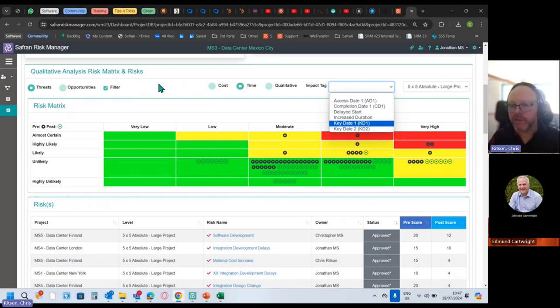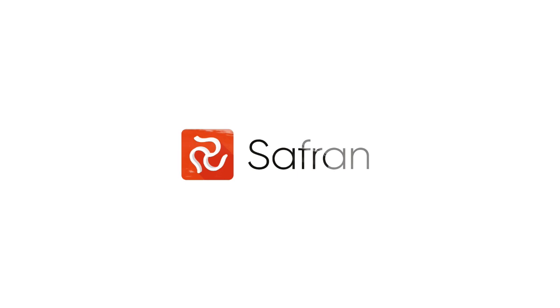Actually, there's probably more value to be gained out of this qualitative system by categorizing against impact categories, where the impact category is the objectives. I know, who'd have thought? It's what we're here to do. But you won't often see that thinking happening in other people's spreadsheet risk registers or whatever.